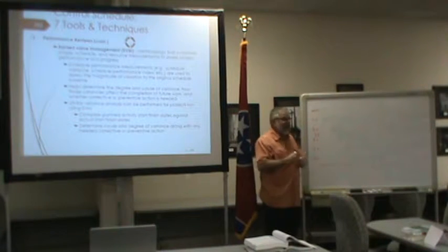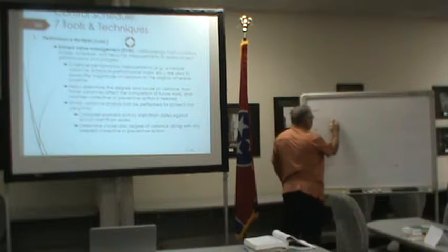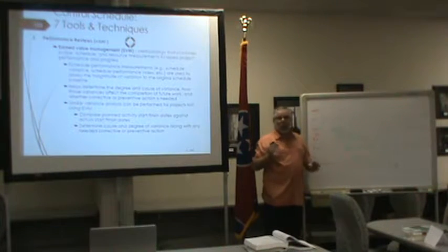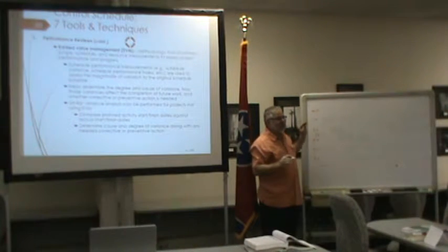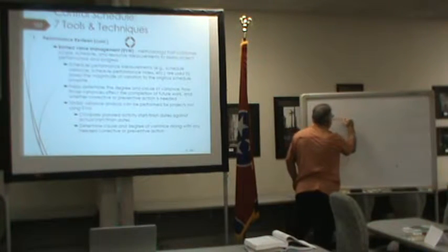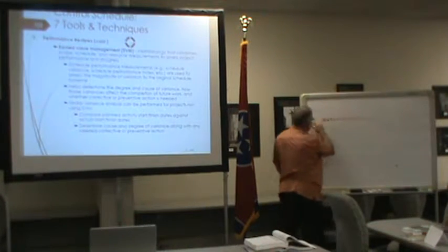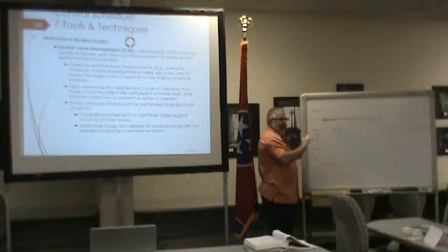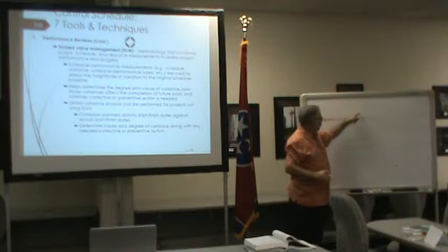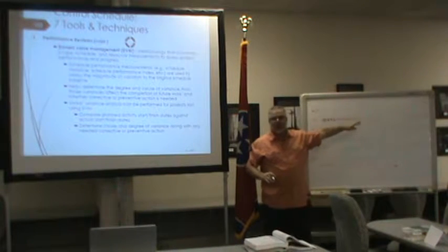So what we said was, if I understood how much each of these tasks were going to cost me, and I could spread that cost across time, I would create, let's say that's project management, and I'm going to have 4 FTEs working on it for 1, 2, 3, 4, 5, 6, whatever those 6 periods are.